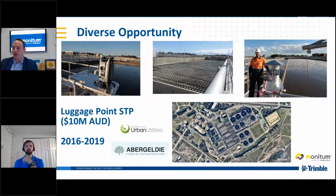So the whole system is a 24-hour system. These tanks very, very rarely get drained, and while they're all full and operating, everything's stable. There was a big risk that if you take the effluent out of one of these tanks, it could compromise the integrity of the tank. But also, if there was some sort of collapse or leak, the people working in that tank would be exposed to some of the materials. So it was quite a high risk activity.